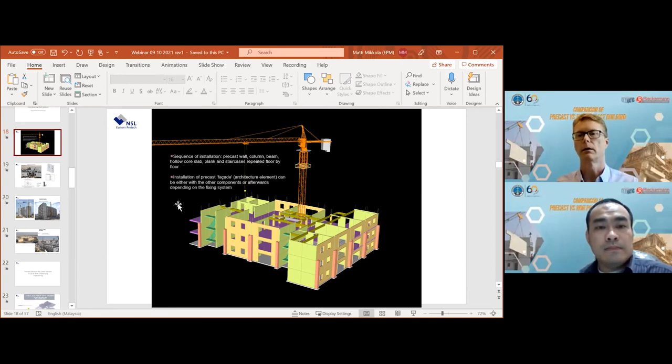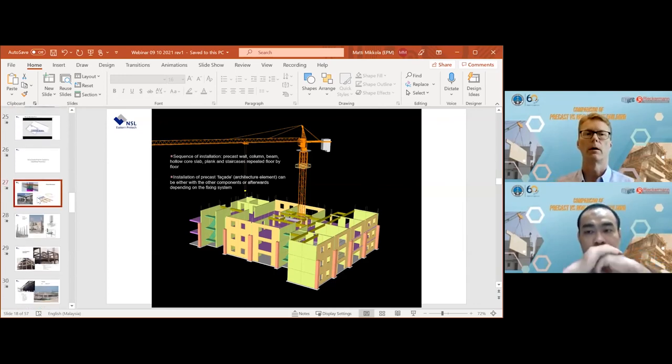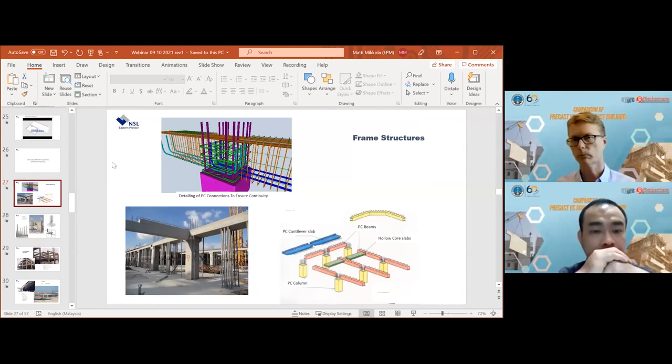Secondly, the installation of components using these systems is much faster than a wet joint. But let me explain. If you have a wet joint connection, as I showed in my slides here, typically this one on the left. So these two beams coming in right and left side, once they are installed here, there is a portion in between here that needs to be cast with wet concrete. Now that connection has to harden first before you can continue and install up.